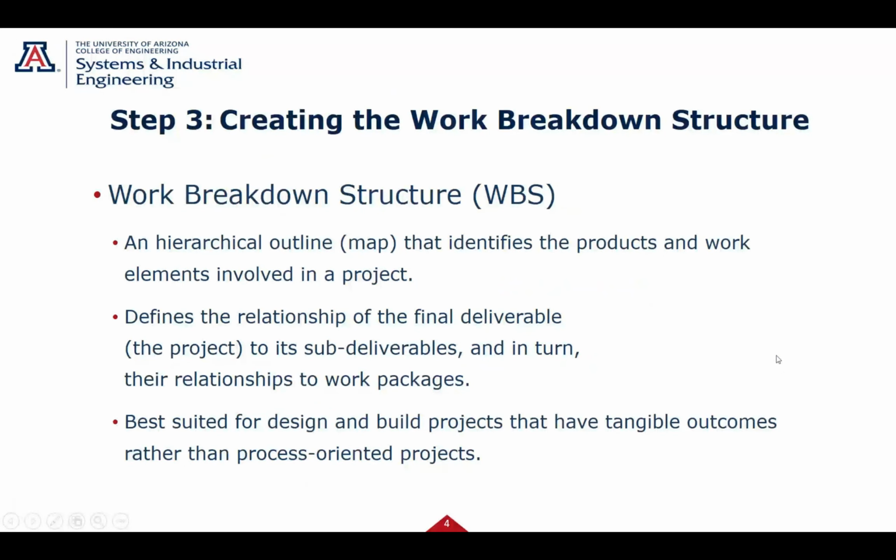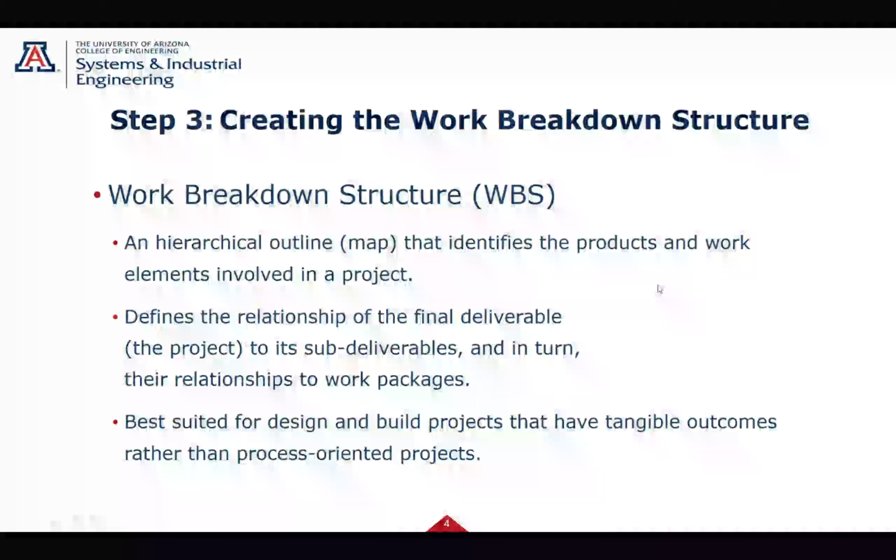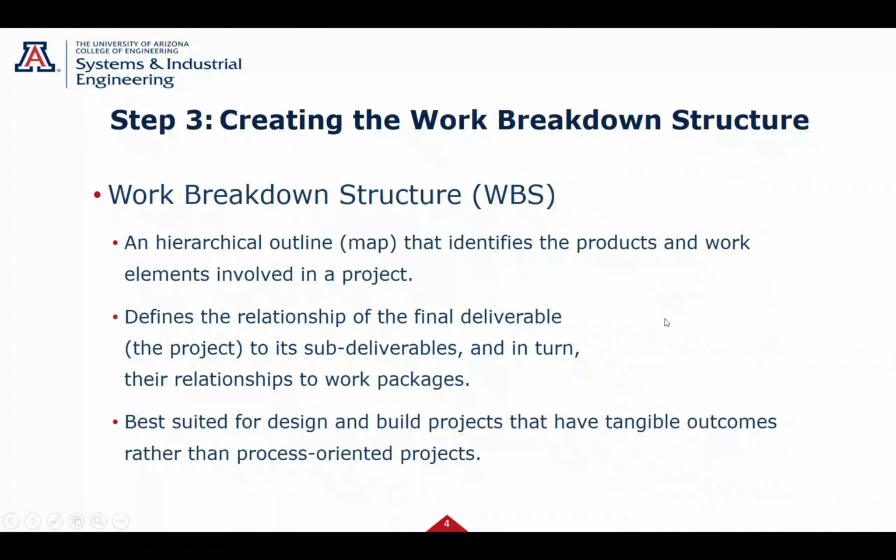Again, you'll hear WBS. It's a hierarchical outline or map that defines the products and work elements in a project. You're going to see that. We're going to have a hierarchy of the products we need to deliver. Okay? It defines the relationship of those and the subdeliverables, and eventually what we're going to get to at the bottom level of this diagram is what we call work packages. What is the work you have to do on that project? So that's why this is very important, because we're going to end up getting down to what work we have to do.